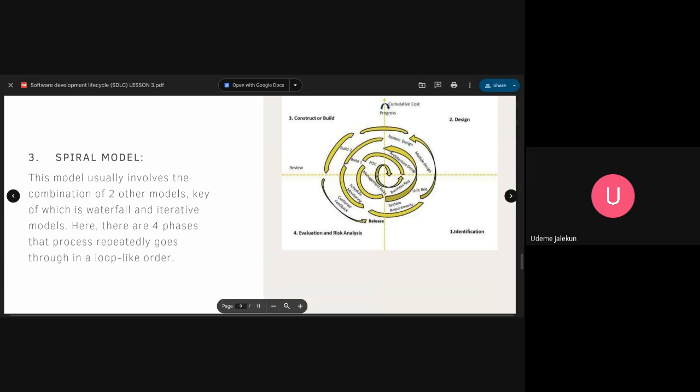Each of those new features had to undergo an iteration like this, where they say, oh, we want to add this feature. The business analyst says, okay, what are the requirements that this new feature should have? They do phase 1, which is requirement analysis. They then give a product designer the task to design the screens for this new feature. So it's like a cyclic motion. After they design, developers write the code. After developers write the code, tester tests. After tester tests, they push it to production.